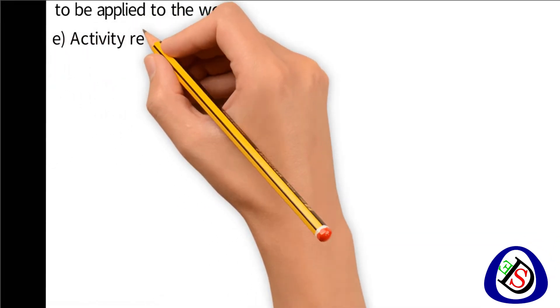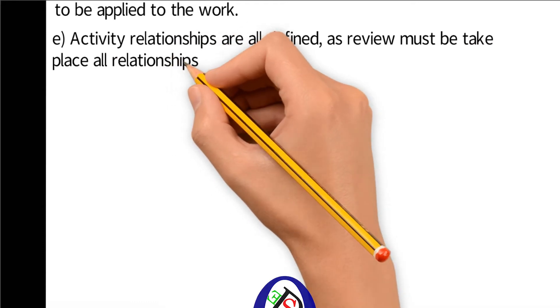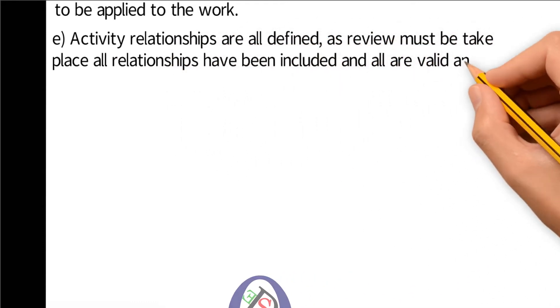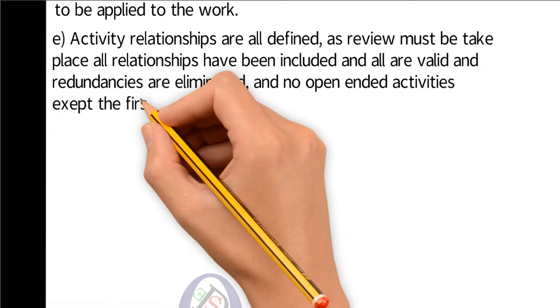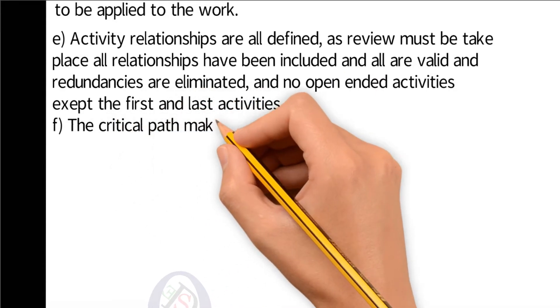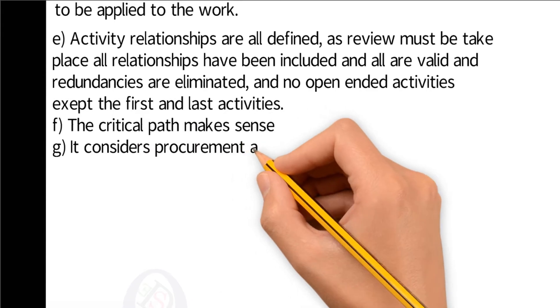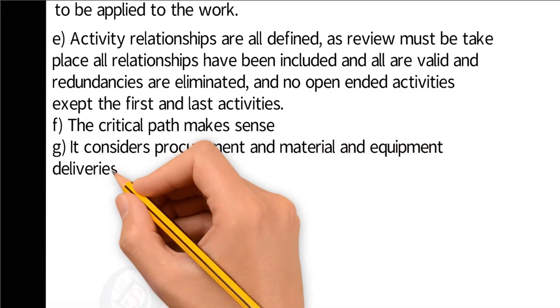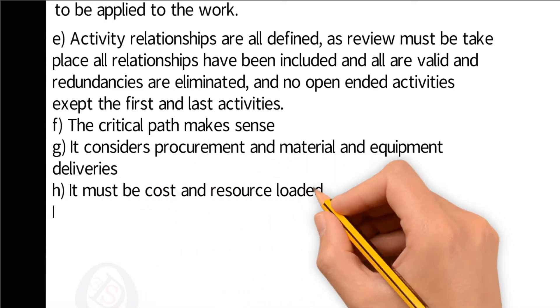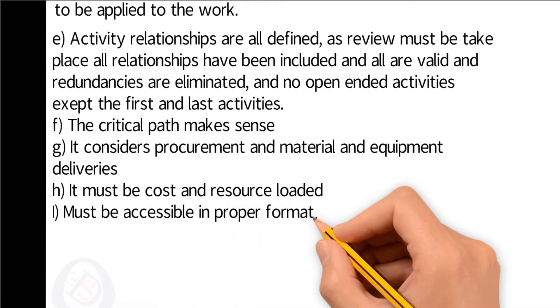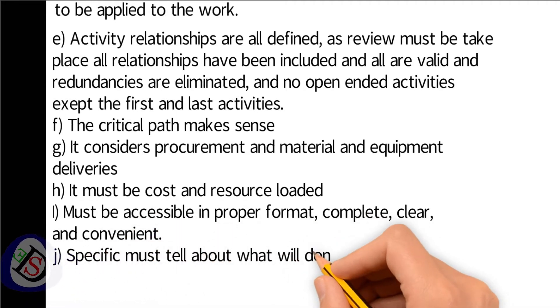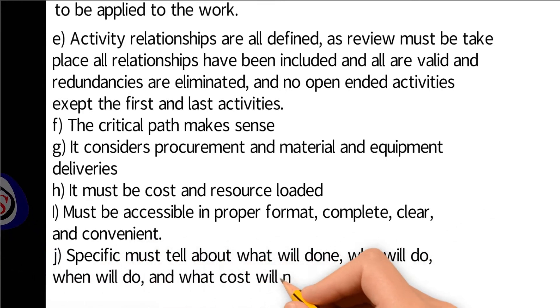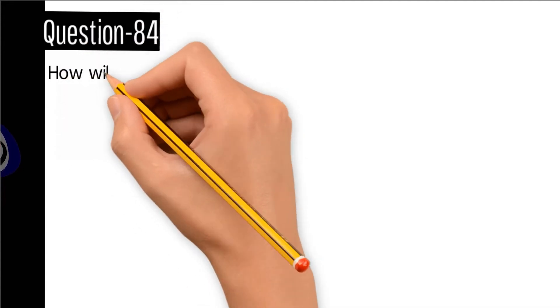E) Activity relationships are all defined — a review must take place, all relationships have been included, all are valid, redundancies are eliminated, and no open-end activities except the first and the last. F) The critical path makes sense. G) It considers procurement and material and equipment deliveries. H) It must be cost and resource loaded. I) Must be accessible in proper format — complete, clear, and convenient. J) It must tell: what will be done, who will do it, when it will be done, and what cost will be needed.